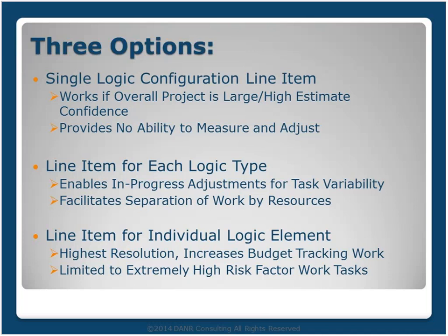So you've worked on this control system with this client before, you know exactly what you're getting into, and you don't have any concerns about the logic taking more time than what you've budgeted. But the downside to this approach is that you have no ability to measure whether you're making the expected progress and to make any adjustments if you aren't. So, for example, if you start seeing that the safety interlocks are taking an hour longer each than what you budgeted, you have no insight into that.